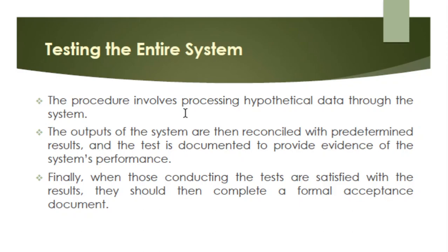However, if the predetermined result matches the result of the test run, you can say that the system is working well. Now, finally, when those conducting the test are satisfied with the results, they should then complete a formal acceptance document. The user acceptance document becomes important in reconciling differences and assigning responsibility during the post-implementation review of the system.